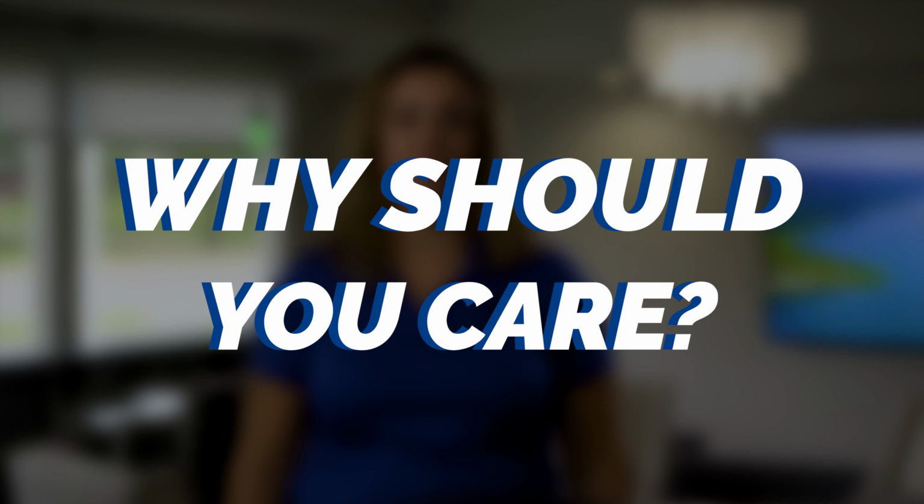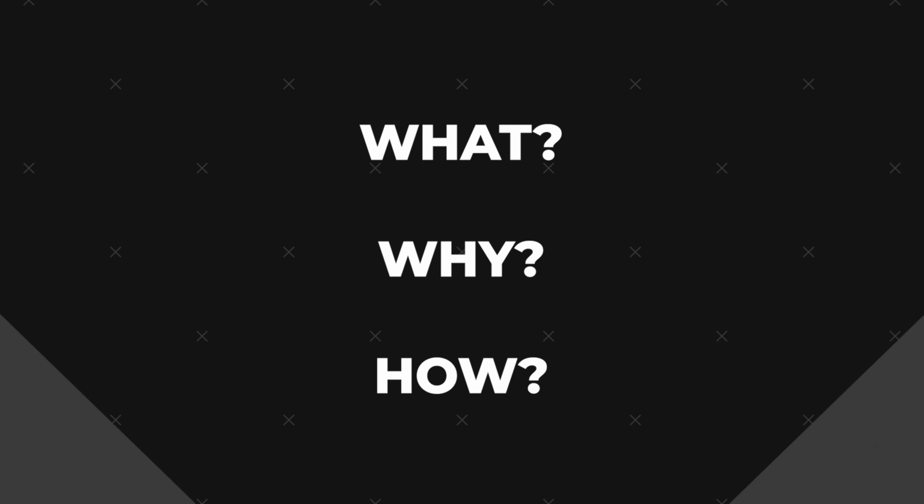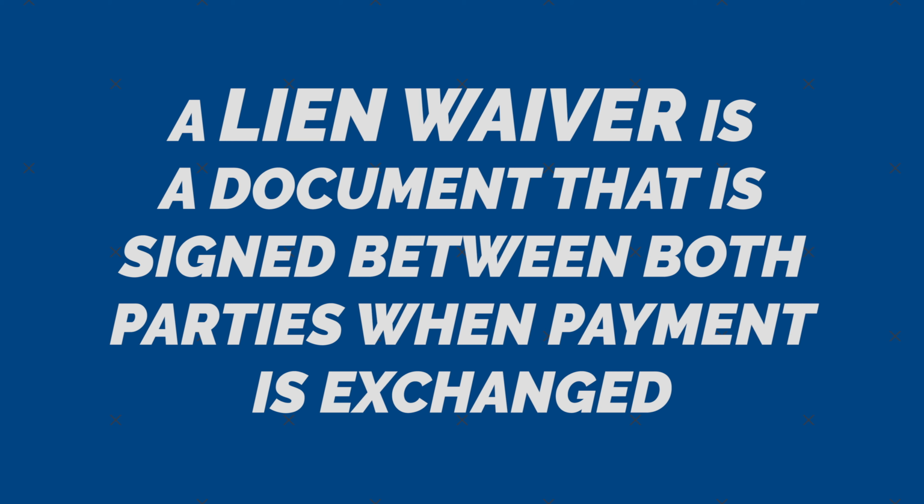Why should you care about lien waivers? Lien waivers should be tied to almost every payment in construction. Their importance should not be overlooked. I'll tell you what they are, why you should send them, and a few best practices for managing those lien waivers. A lien waiver is simply a document that is signed between both parties when payment is exchanged.